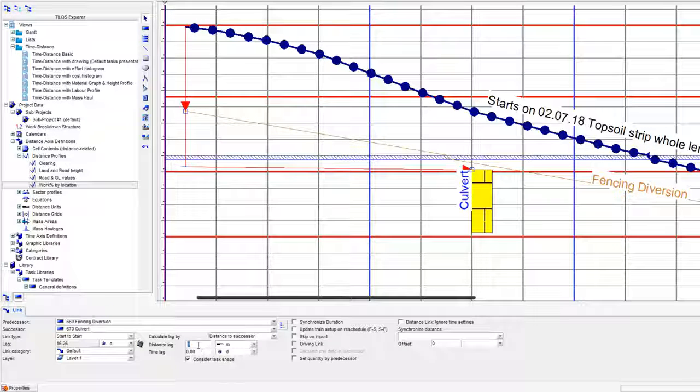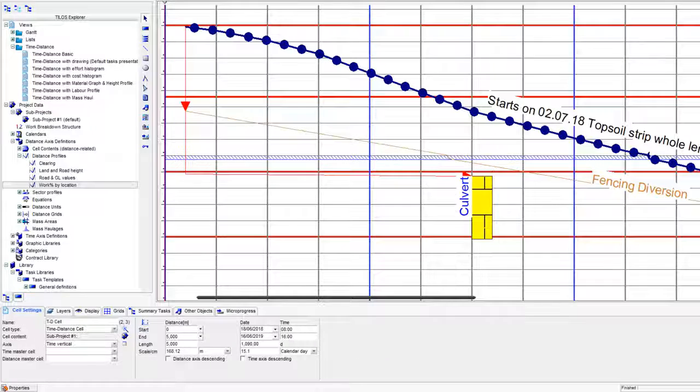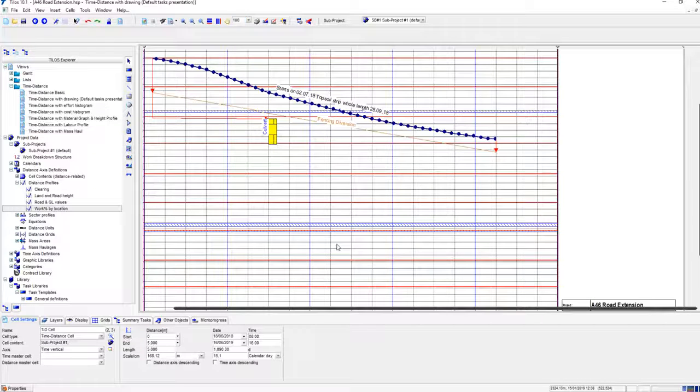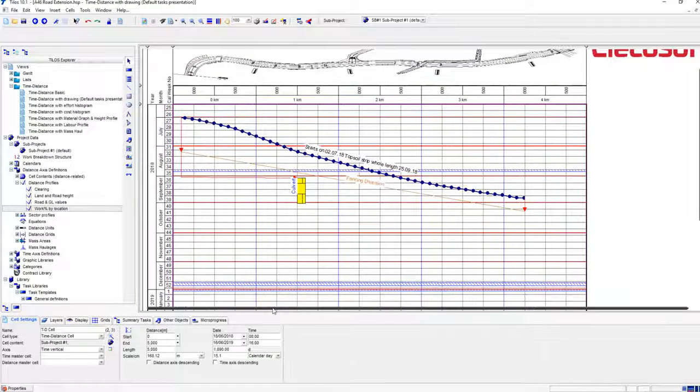We might want the fencing crew to be 250 meters down the track and away from the danger areas for safety reasons, and then it'll keep the two things away and calculate where they would touch 250 meters down the track. So some very powerful capabilities in using distance as a lag for shafts meeting tunnels, or pipelines meeting crossing points and such like. Very powerful feature.